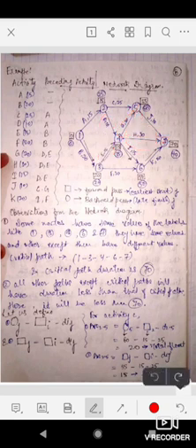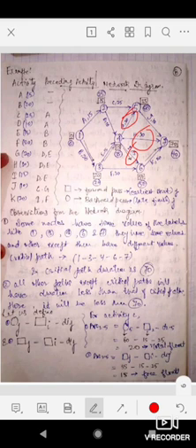After that you can see activity I is also following D and E. We have G here, which is also following D and E, H is also following D and E, and I is also following D and E. So all three activities will be started only after the completion of activities D and E. You can see from here that G, H, I, these three activities are following activities D and E.